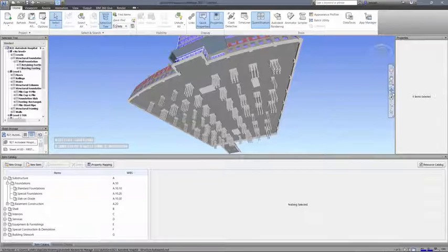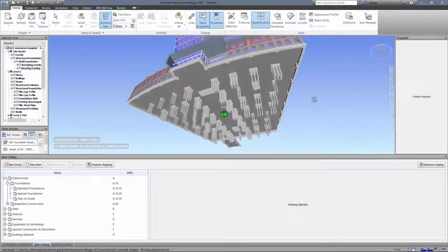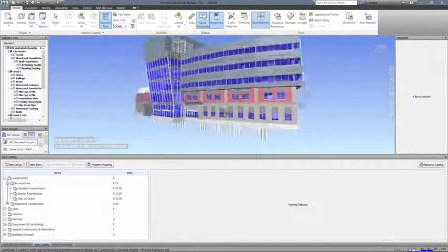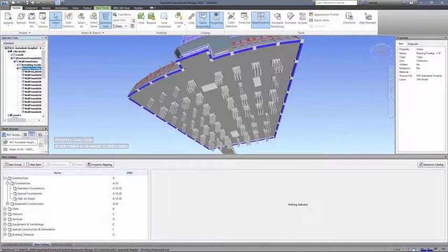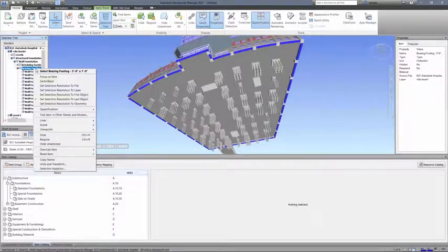Here, we are working with item and resource catalog information in order to classify the model elements further than the model authoring tools can. With the catalogs available, we quantify the model using intuitive tools in Navisworks. The quantification workbook is our central location to create and manage the quantities within our model.